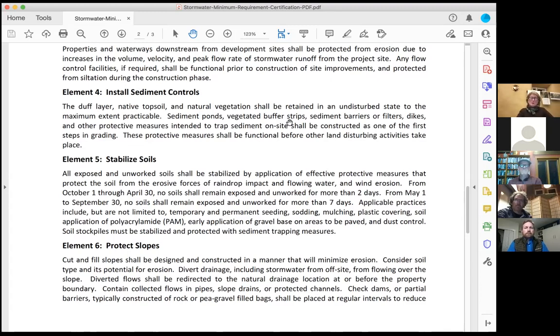It's no problem. Sometimes I'll invite them out before they actually come to do the job and say, this is how I'm setting it up. Once you come over, take a look in the next couple of days, tell me what you need, whatever, because sometimes I just can't imagine how much space they will need to really be able to get around. And so it's good to have that.